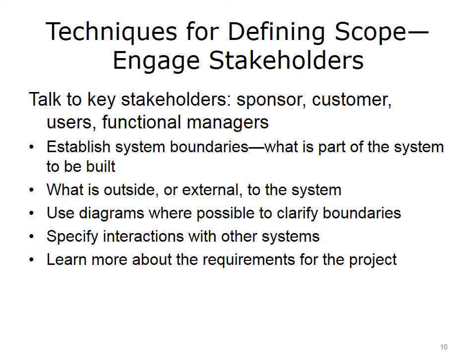A simple notion of scope is simply to be explicit about the system boundaries and what data items and data flows are crossing the boundaries from your system to other systems or other entities or organizations. Interface issues, especially with other IT systems with which your system is going to interoperate, are often best resolved at the start of the project. Remember that diagrams can help you.